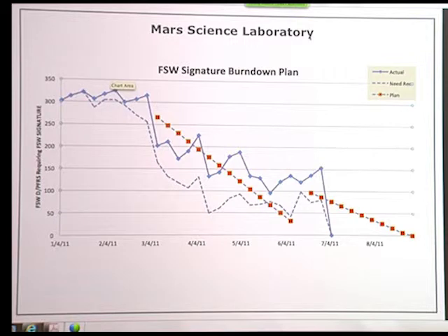The software team used the JIRA tool, which I think was extremely effective for many reasons, but one of the main things we used it for was internal issue tracking and software change requests as well, in the same form. And that tool was specifically designed for the flight software team to use. It had a lot of software-specific life cycle fields, which weren't captured in the institutional system.